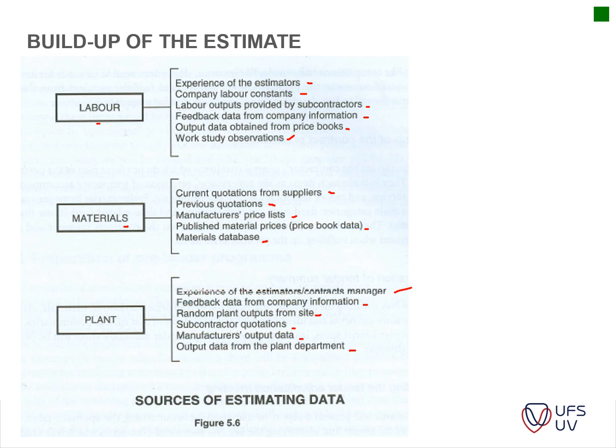So on this project, it will maybe be needed for an hour. It has a cost of 6,000 rand per day, depending on the size of the excavator. And then you can calculate, okay, this will be the cost of excavating this section.